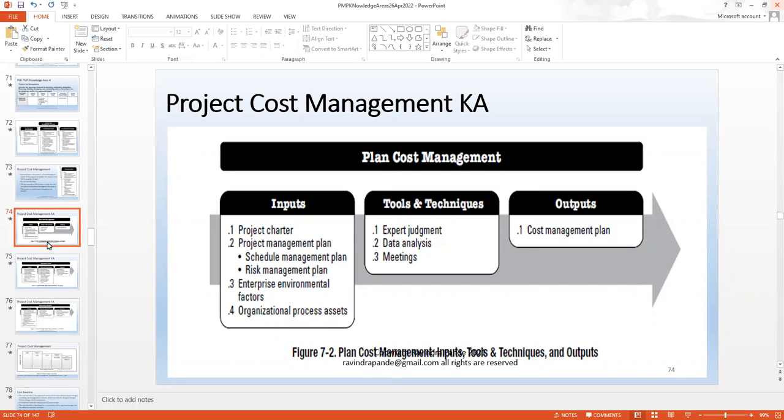Again, the project can cost around $10 million. That's what we want to get from the client. But at actuals, we need to understand what type of cost I have in terms of my project allocation, because quite a few of those cost parts are allocated to organizational processes like sales management, which is not a burden on your project, like overall PMOs, overall brand building, brand marketing and everything, which is not actually billed to your project, the resource management, which is also external to your project, the procurement management, which is also external to your project.